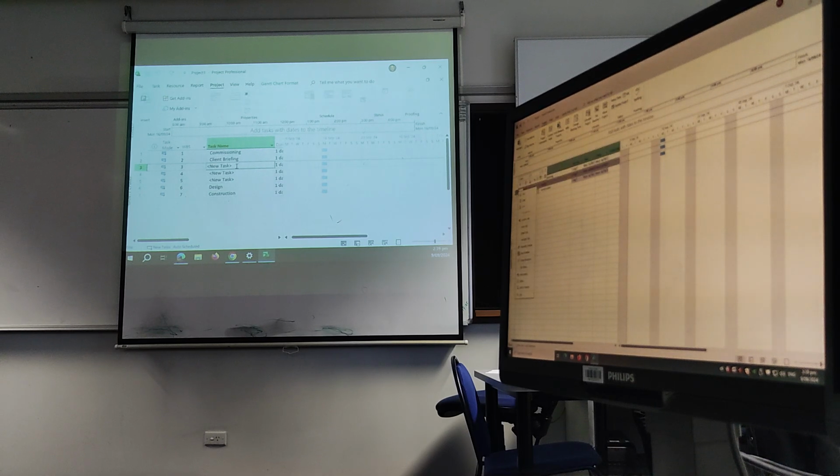And I'm going to do the next one, which is a client approval. So now I look at those two things and I say, together, do they comprise the commissioning big bit? Yes or no? Yes, they do. So now at present, you can see that the WBS thinks that these are at the same level as the commissioning. So what we need to do is tell it that these are children of the commissioning, that they are one level below it.